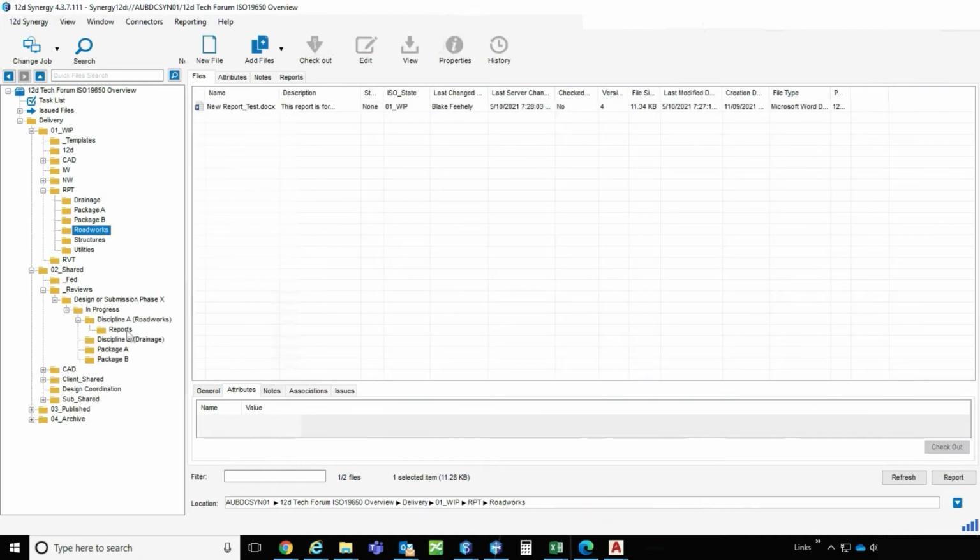And so essentially our shared document is a snapshot in time, perhaps against some program deliverable or milestone, but as we progress the work in progress document is no longer a current representation of that document. This process may repeat once or it may repeat multiple times.